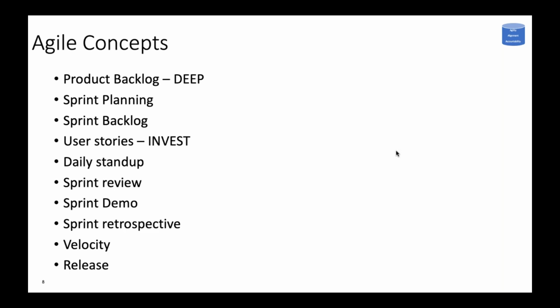Once you have done the work, once the user stories have been accepted, they will go into something called release. And here, what you have to remember is the release happens on demand, because it's the customer or the business who will decide when a particular feature should be released to the end user. Just because IT has finished the work doesn't mean that it will be automatically visible to the end users. It is the prerogative of the business users to release the features to the end customer. Your job as an IT team is to keep delivering valuable software, package it, and make it ready for release.